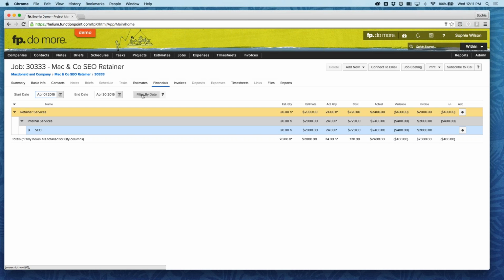So you'll actually see within the month of April that we had our estimated 20 hours for our $2,000 that we would charge our client. However, we spent 24 hours working on this job this month. So our actuals were $2,400, but we still only invoiced them for $2,000, so we actually had a loss of $400 on the job for this month. So this is how this job financials page for this retainer is really beneficial for you to see if it's